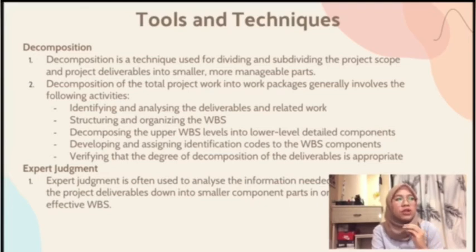The level of decomposition is often guided by the degree of control needed to effectively manage the project. The level of detail for work packages will vary with the size and complexity of the project. Decomposition of the total project work into work packages generally involves the following activities. First is identifying and analyzing the deliverables and related work.